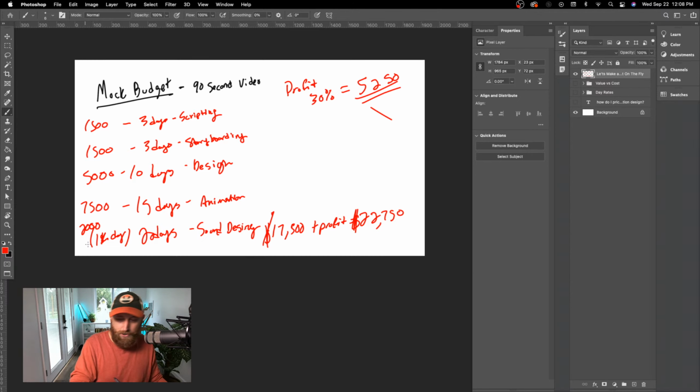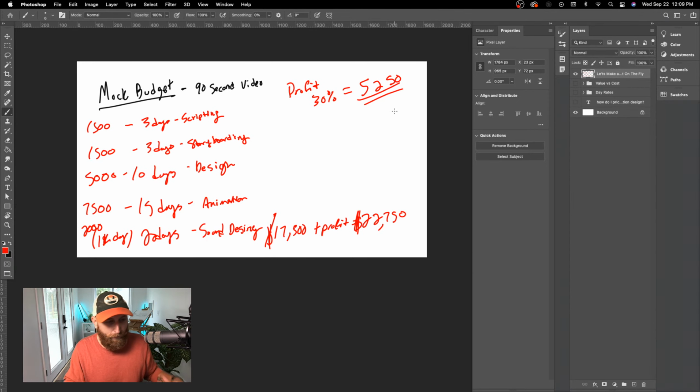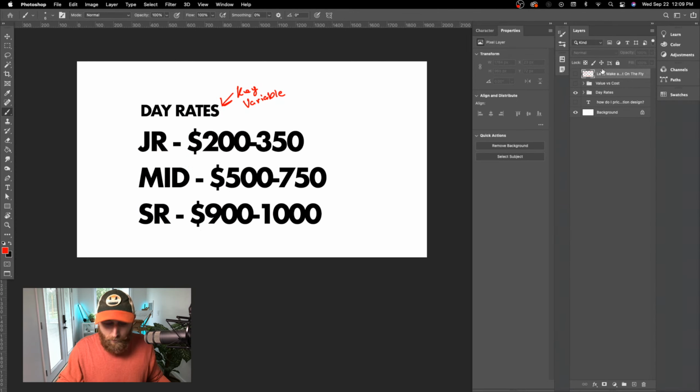Now, if there's anything that we're leaving out or forgetting, if we're going to hire out or subcontract maybe a really great illustrator to work for 3 days and they're charging $1,000 a day, then we would need to reflect that. But let's say I'm doing everything at the $500 a day rate. Now, again, we come back to this idea of like, well, this is a very powerful variable, right?